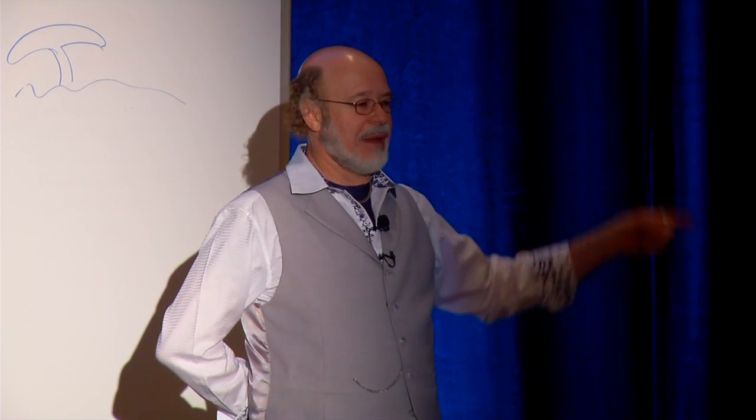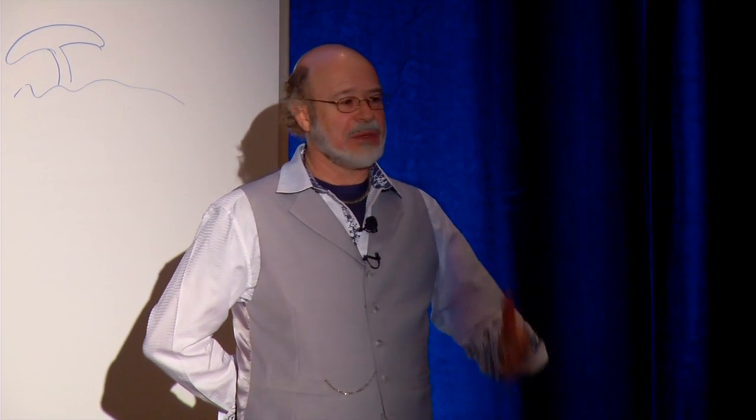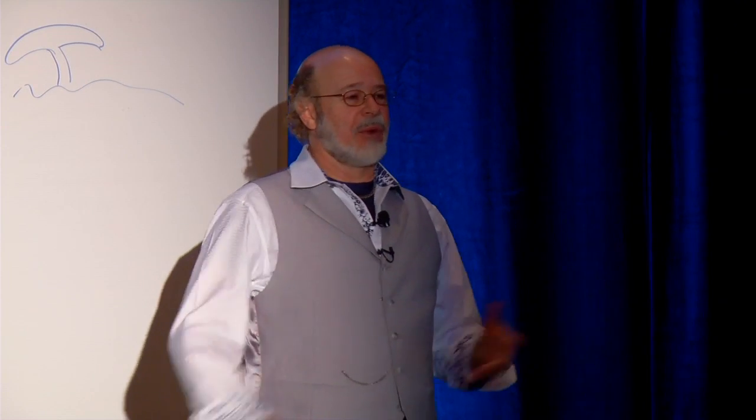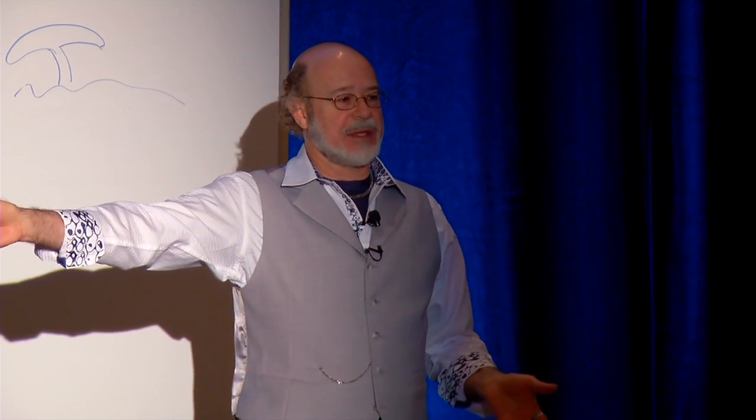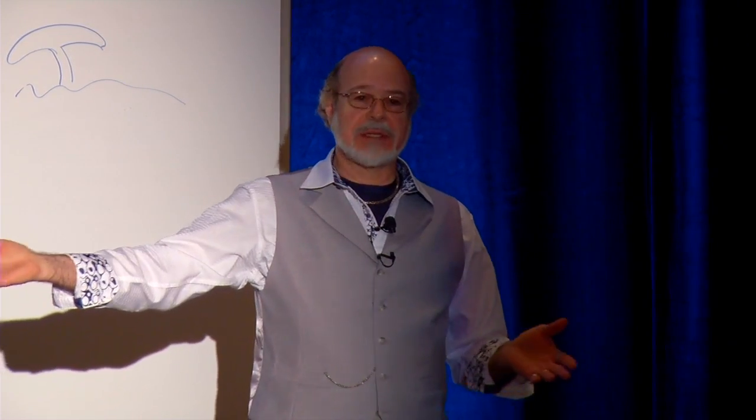Which would you rather have? This 1 or 2 items that you've just handed me, where I have to write a new section for it, and we're going to delay the project one day because I physically can't get this done in this amount of time? Or do we want to make that addendum number 1?